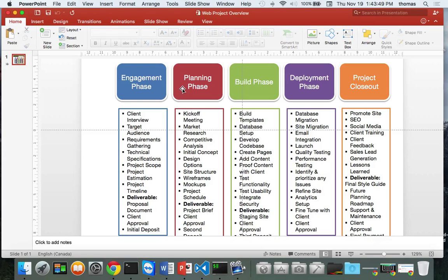You're going to start creating your pages and your views. You're adding your content. And by the way, if the customer doesn't have content, that's a side project. That's not something that is part of our web development build, typically. The customer has to provide the content, the images, all that kind of stuff. If they don't, you can certainly set up another project, a separate billing, where you're going to have to hire a copywriter, someone who makes the content, or a photographer to take pictures, or whatever. That's a separate process. And the site completion might be dependent on that stuff, but it's not something that we do as developers. It's not something that's inside the stuff we do.